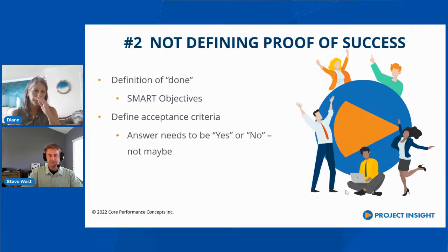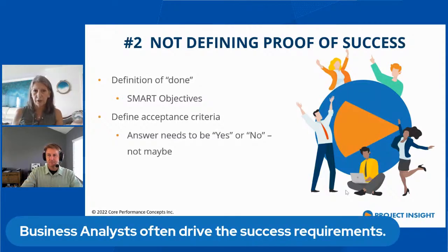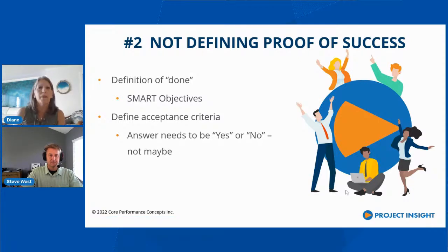Now, I'll also ask the question out here, hypothetically, how many objectives should you have in a project? Most of the time I get people answering no more than 10, or 5 or more. But the reality is maybe 3 or less. The reason I say that is, if I have 3 objectives and I miss one, did I succeed?